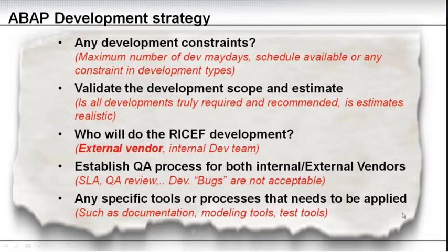If such is needed, or your external vendor expects you to have these tools in place, you need, as part of the proof of concept and establishing the project infrastructure, which we covered in course 1, to make sure that you have the development tools as part of that tool strategy, and you have it in place well ahead of when you need it. So this is of course easier said than done, but knowing these pitfalls is the first step in avoiding them.